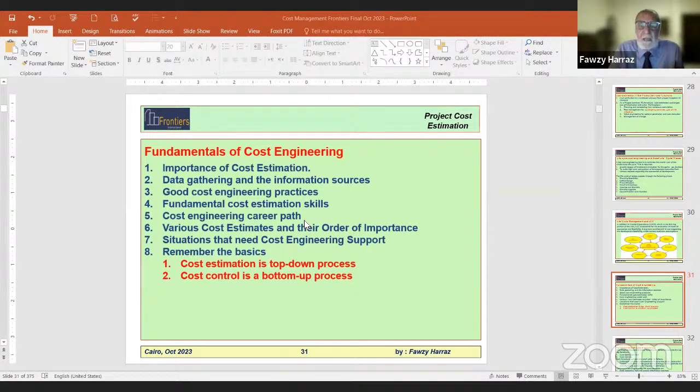Maybe for the concrete, you have to consider, and this is attention to detail, as I said, this area is blocked from various things, so I cannot approach with the truck mixer. So I have to use the pump. This you will add on top of the rates. The contract rates assume concrete poured by truck mixer. Now this will not be, so you'll add the cost of one concrete pump working maybe for 4 hours or so. So this is a very simple estimate. It can take you maximum 1 man-hour, and it will be half a page or 1 page maximum.